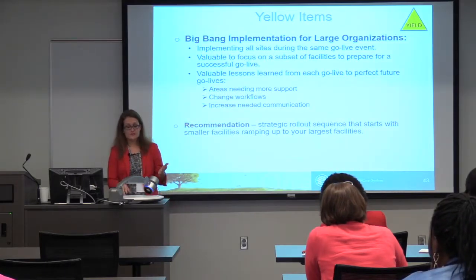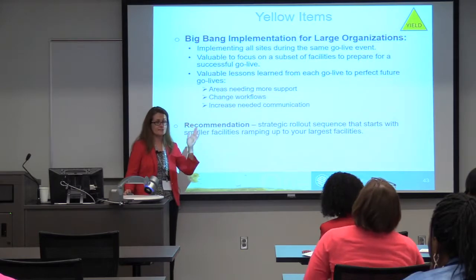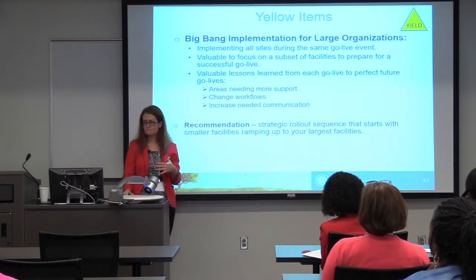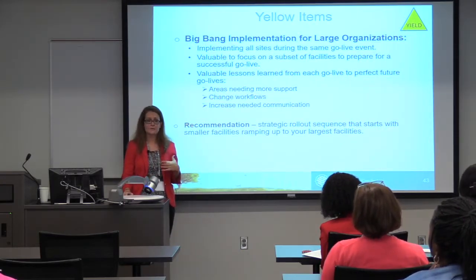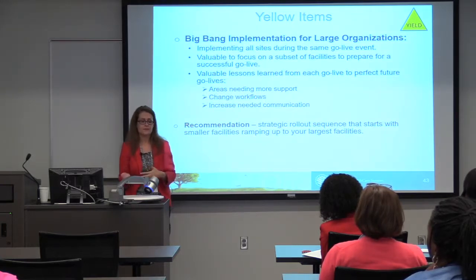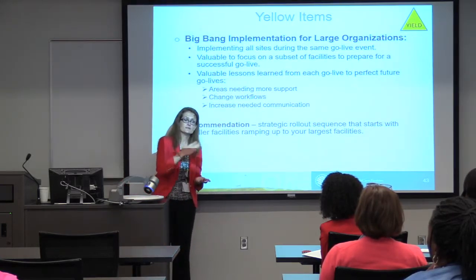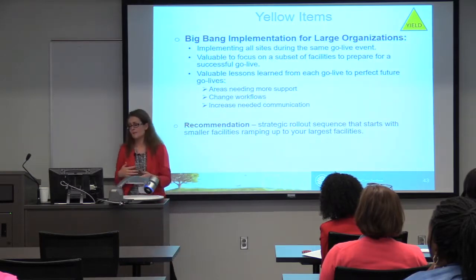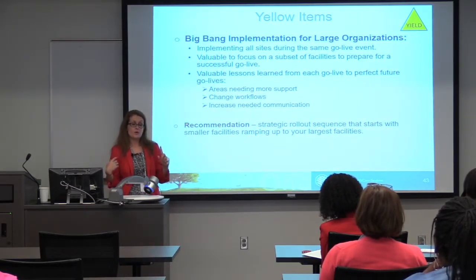We've had a lot of lessons learned as we've gone live at each location. Number one, what day of the week we go live on. First, we went live on a Saturday night and found that it was better for the EDs to go live on Friday night. Also, what we found at each go live is that maternity needs a lot of help.